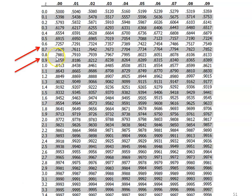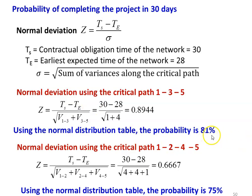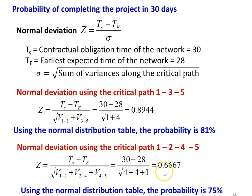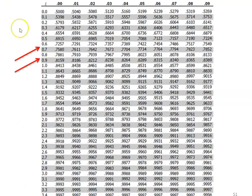From the normal distribution table, for Z = 0.8944, the value falls between 0.7881 and 0.8159; by interpolation the probability is 81%. Using critical path 1-2-4-5: Z = (30 - 28) / sqrt(V(1,2) + V(2,4) + V(4,5)) = 2 / sqrt(4 + 4 + 1) = 0.6667. Using the normal distribution table again, the probability is 75%. So, for Z = 0.6667 the probability is 75%, and for Z = 0.8944 it is 81%.